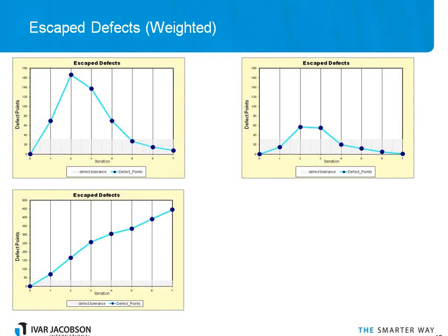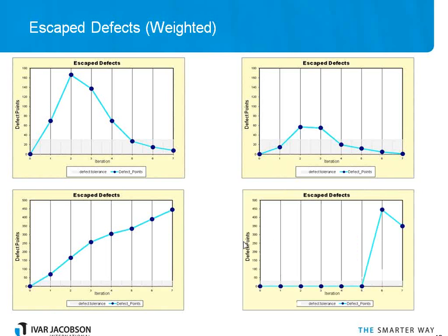Now, this is something that happens on a lot of iterative projects, because one of the things that iterative projects find is they get overly aggressive. So they don't leave enough time to do all the work in the iteration. So what do they drop? Testing. Well, they don't finish stuff, or they don't fix it, so they put in the rubbish and it exposes lots of defects. You might see a graph like this, where for many iterations there's been no testing until the 6th iteration, where lots and lots of defects have been found and they were not able to be fixed within the iteration.